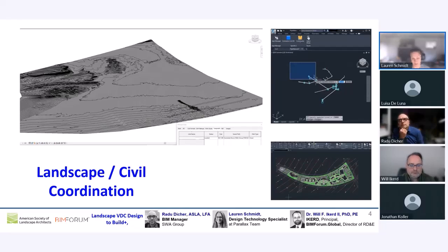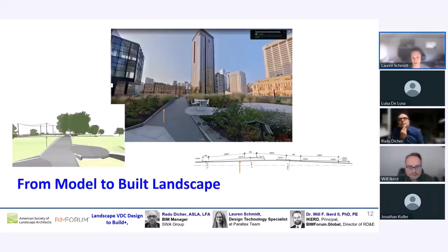So much of the streetscape was on structure, because it had huge, extensive basements. There was so much plumbing to be coordinated. Even typical things at grade that you wouldn't think would have to be tied into the building had to be tied into the building. So it's sometimes still challenging, but still relatively straightforward, because if you're both in the same program, then coordination as a baseline is much easier.